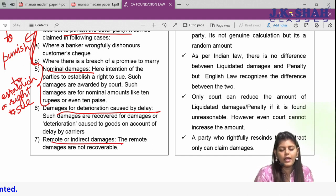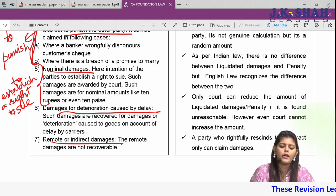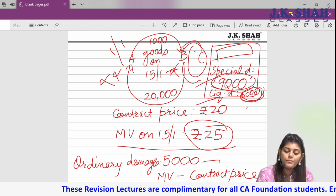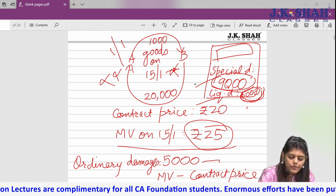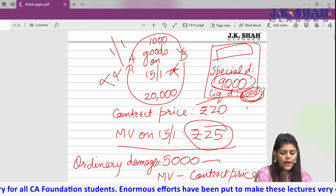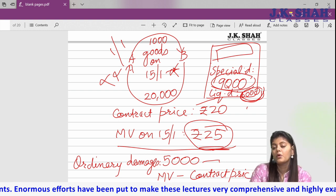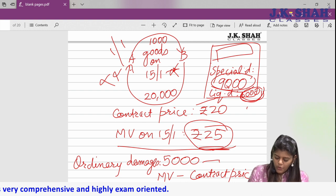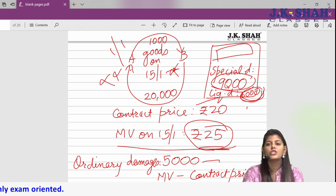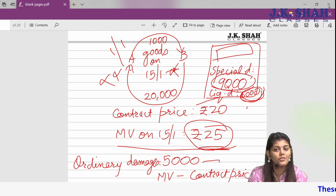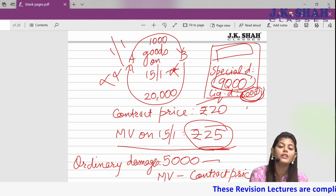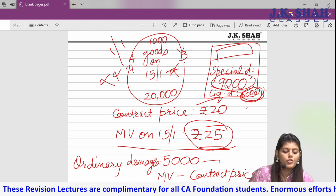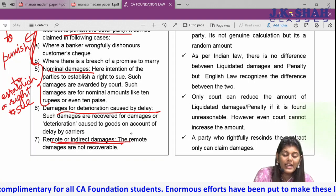Seventh: remote or indirect damages — these are not actually related to your contract and you cannot claim them. Using the same example: A breached, B had to buy goods from the market paying 5,000 extra. But if B says 'because of you I went to market and my wife also came along and did shopping worth 10,000 — so I spent 15,000 extra,' the additional 10,000 cannot be claimed. These are remote or indirect damages.